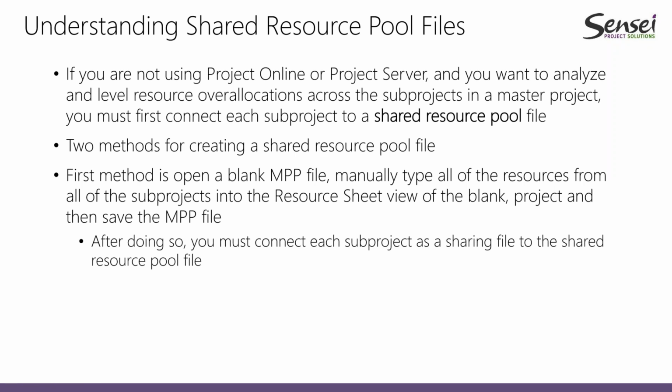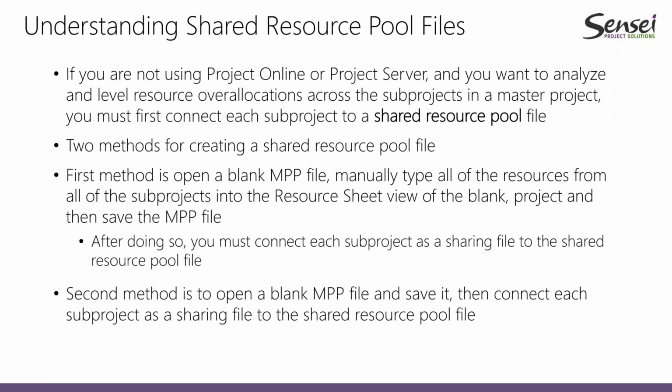Now, after you do this, then what you need to do is connect each sub-project as a sharing file to the shared resource pool file.